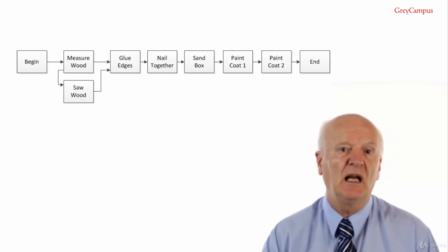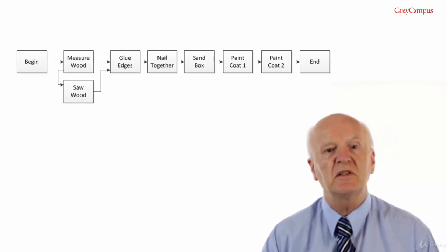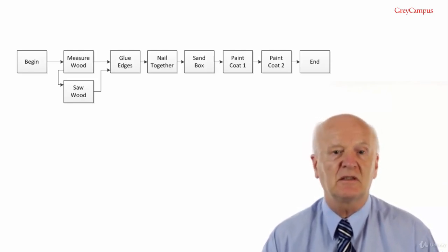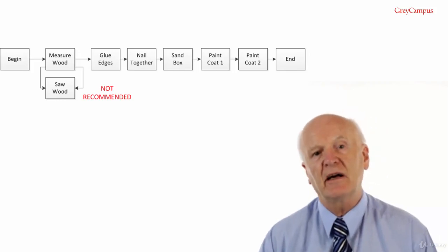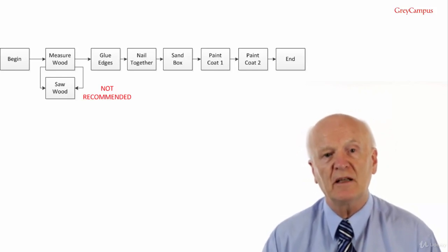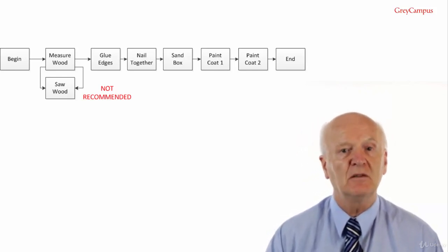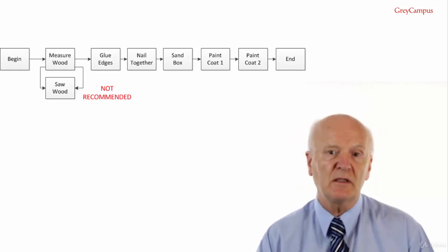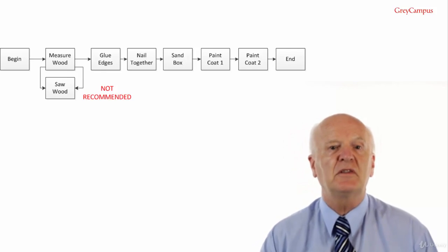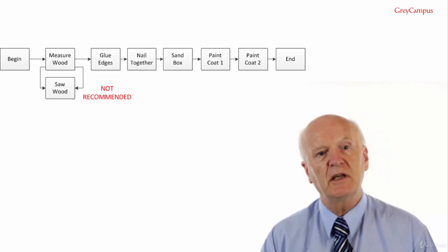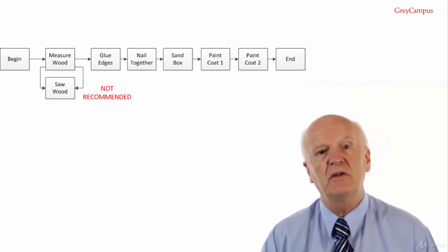Start to finish. A logical relationship in which the successor activity cannot finish until the predecessor activity has started. For example, a new accounts payable system, the successor, has to start before the old accounts payable system, the predecessor, has been shut down. The start to finish relationship is very rarely used, but is included to present a complete list of the PDM relationship types.